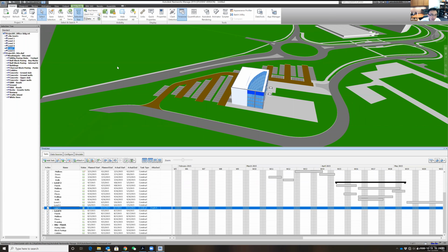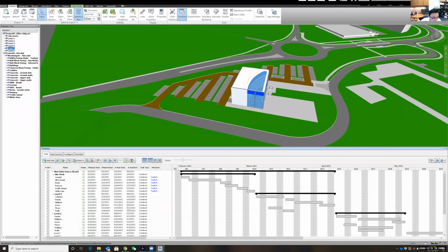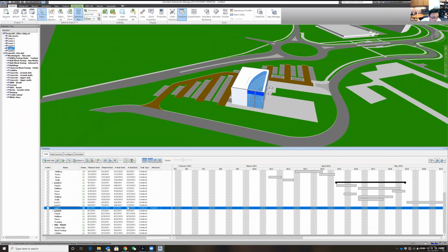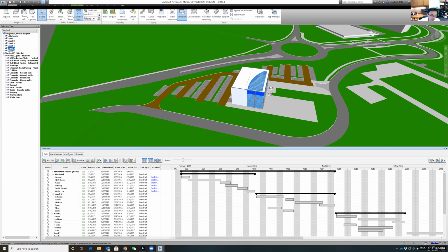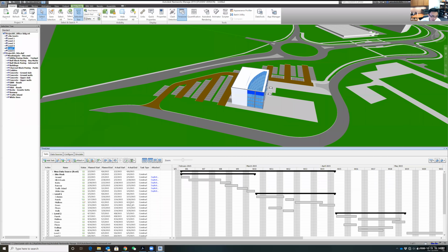And of course, you can also select multiple 3D objects in the selection tree, use your Control key, and link them to one activity. I don't know if I have an example like that. Let me see. Probably not. But similarly, you can link multiple 3D objects to one activity, or link multiple activities to one object, if you developed multiple activities for one thing. Definitely that's something you can do. So it's actually a many-to-many relationship.